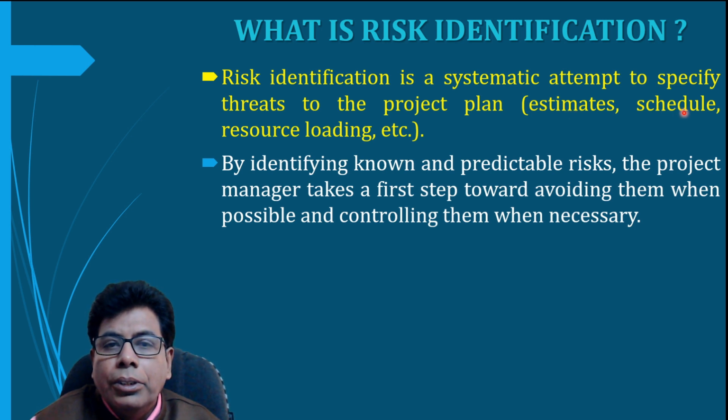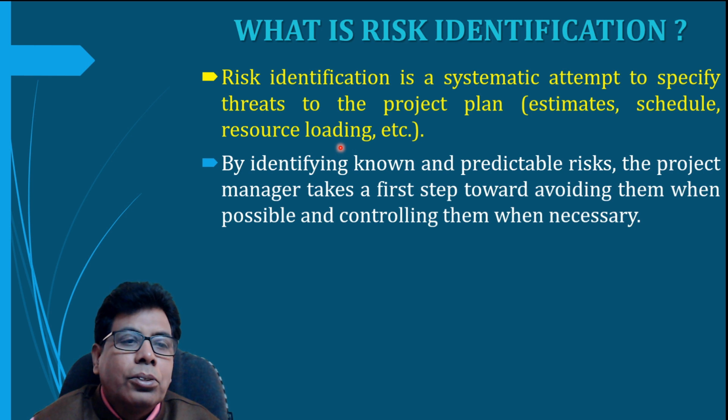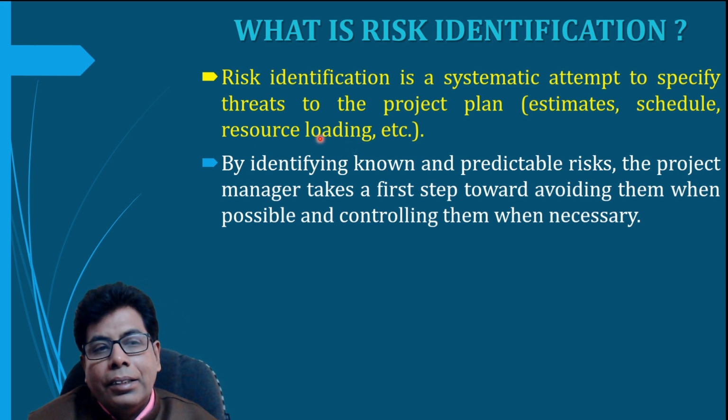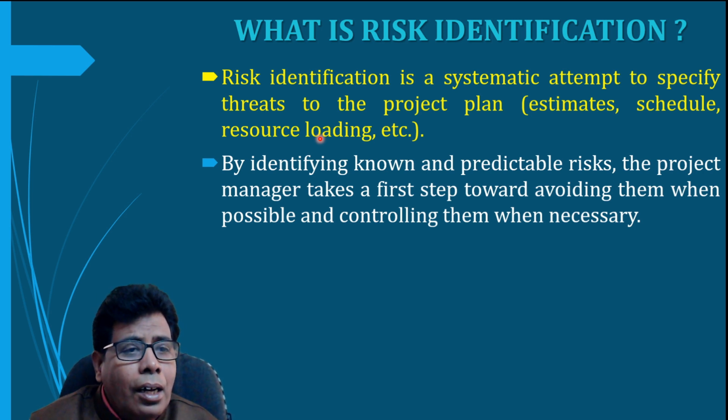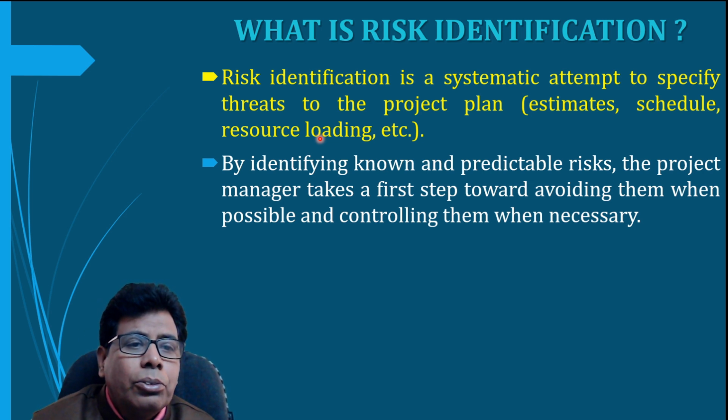Similarly, scheduling. We look at the schedule and see whether it is possible to complete the work in that schedule. And then resource loading. Here we look at the resources within the organization and the number of projects going on, so that we can identify the risk based on that.